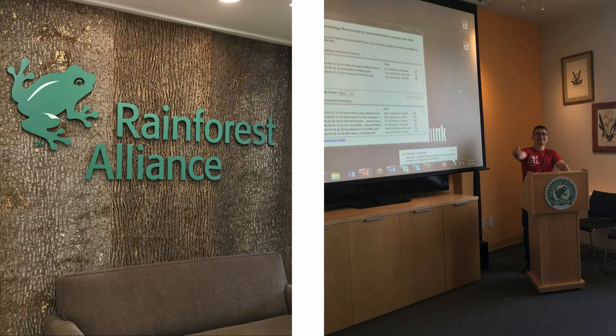So we took all of the epics from the backlog doc and had them put them on note cards, and then we did a planning poker, estimation poker with them, where we had a subject matter expert, a Drupal developer, a Drupal grandmaster actually, if that means anything to people. Because he was part of the backlog development and grooming, he quickly went through each one and just wrote super safe guesstimates on the back of each card.